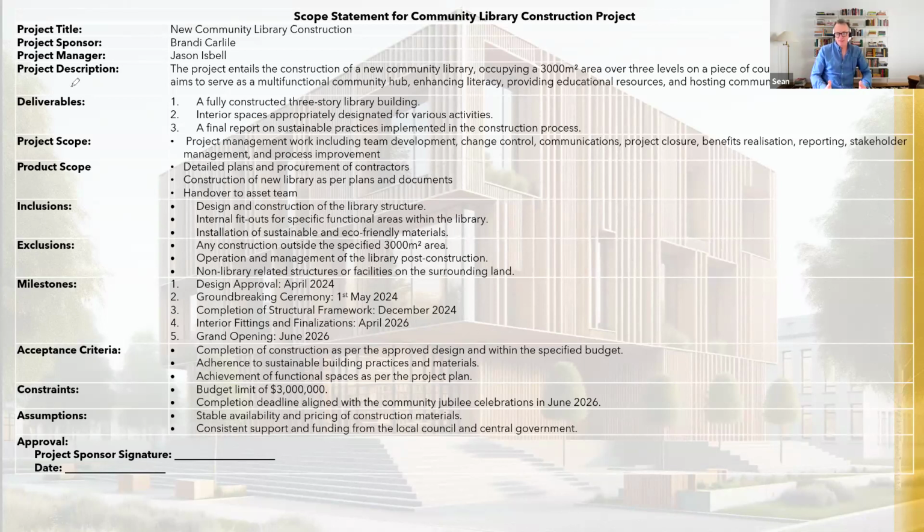Essentially what had happened was a final set of plans had been sent out to the contractors to do the roadworks. And those sets of plans didn't identify that all the trees were protected, nor did they have any special construction methodology around the trees. In the interim, the plans were changed with information from the local arborists to recognise the trees as protected, and a particular construction methodology around the trees, like not excavating within the drip line, using geotextile fabric, etc.